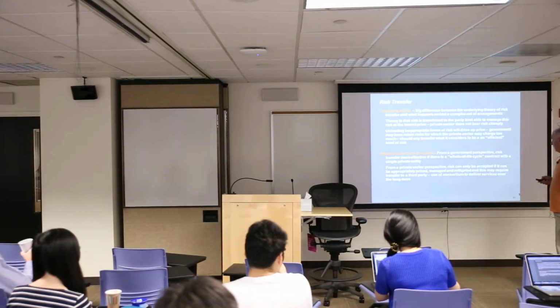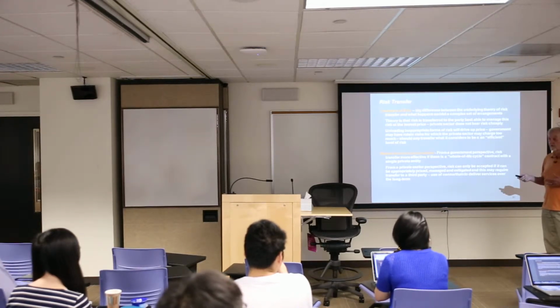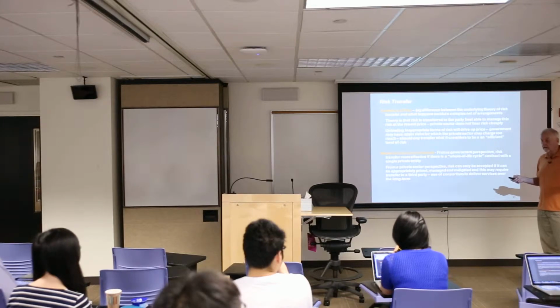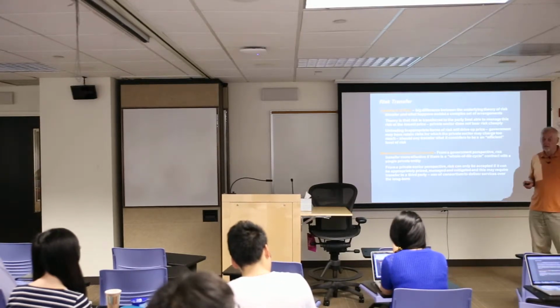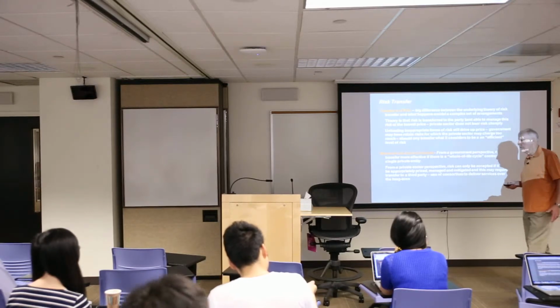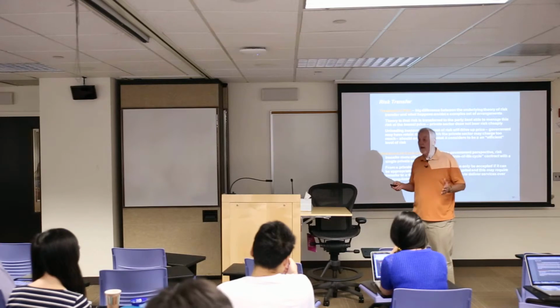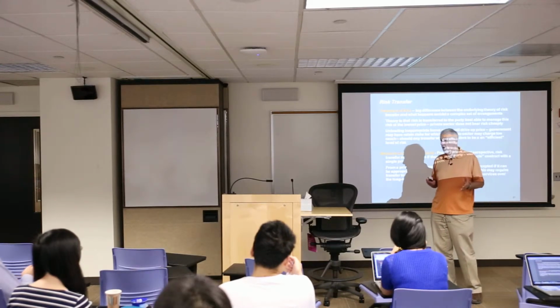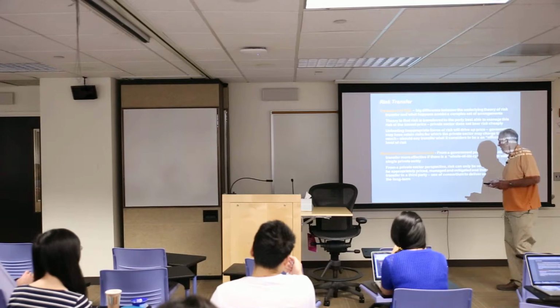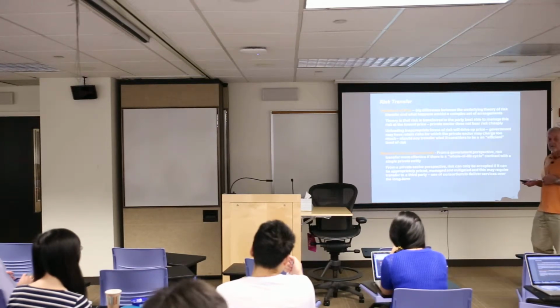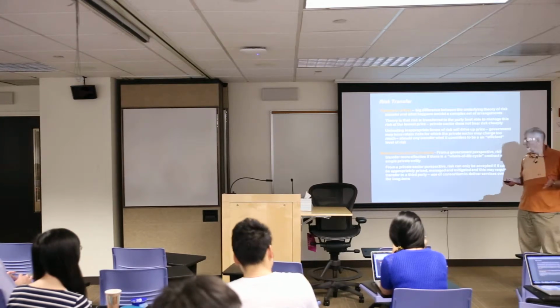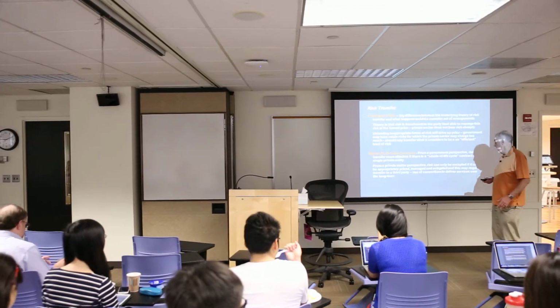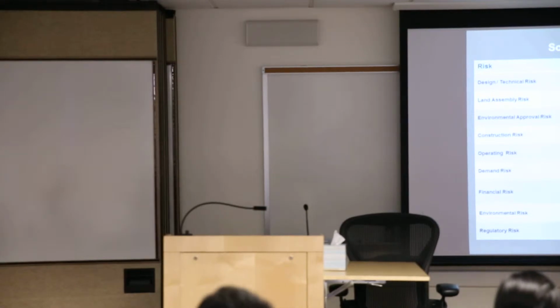And the other part of the risk is the whole life cycle risk. They're taking the risk of that building operating and being functional for 30 years, which, you know, in real estate you could sign service agreements, but whether the roof membrane stands up or not, that would be the owner's responsibility of the building. The other thing is that from the private sector, they can only accept risk if it can be described, managed, and priced. So just to give you some idea of what I'm talking about, here's some of the risks, and here's who would take it, and here's the reason.